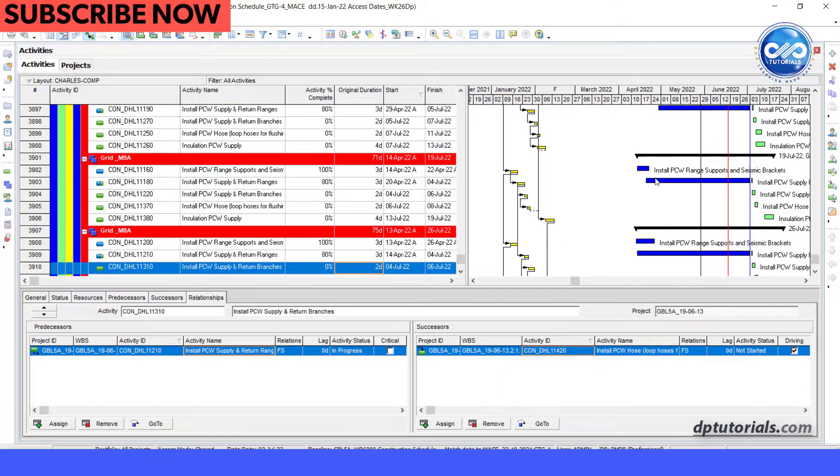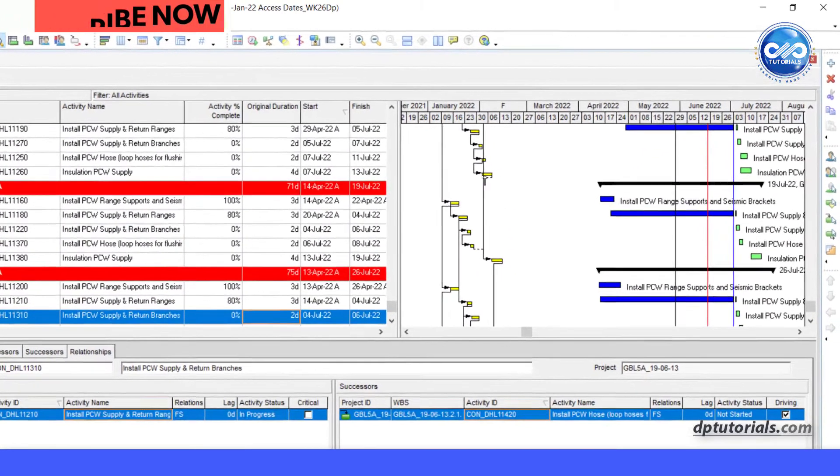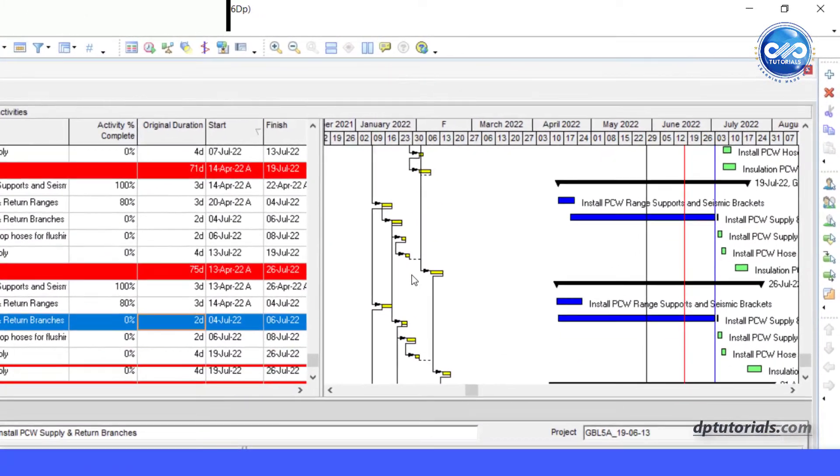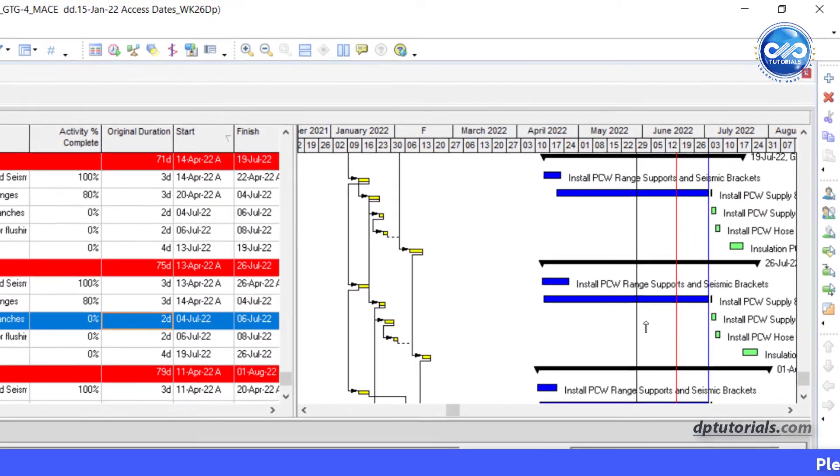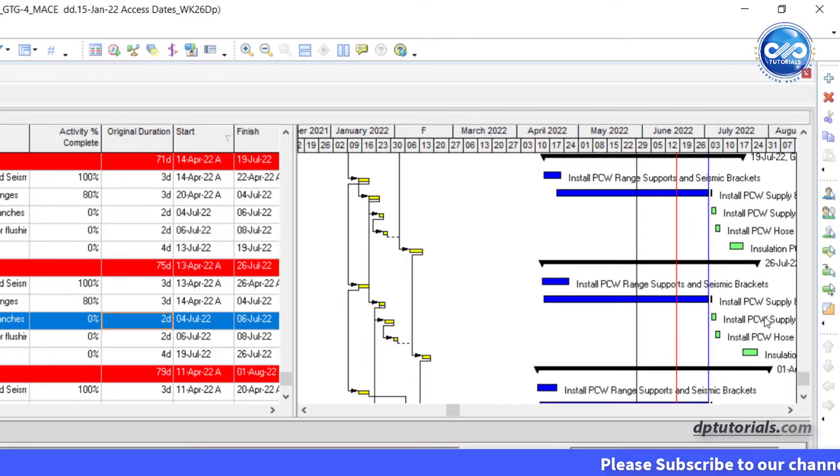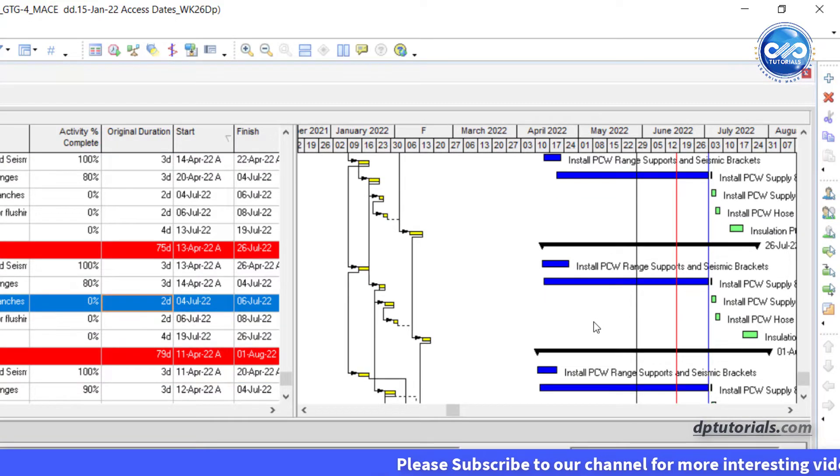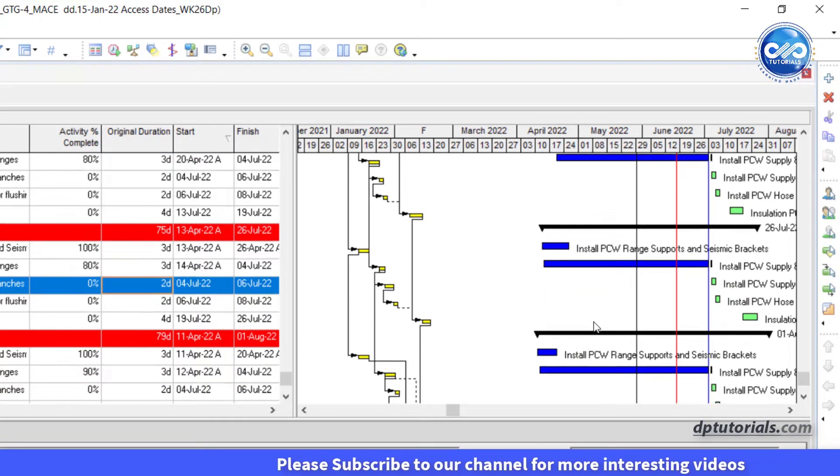Observe my sample schedule here. In the Gantt chart, the yellow bars are my baseline bars and the blue is the actual bar and green is the remaining bar.